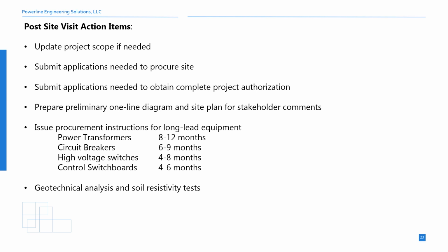Following the site visit, there are several action items for the project team. The project scope may need to be updated depending on the findings from the visit. Applications to procure the site need to be submitted, as well as obtaining the complete project authorization and the notice to proceed.